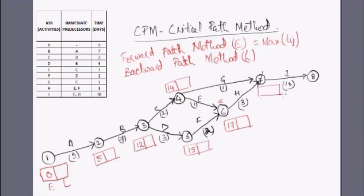At node 7: one possibility is 14 plus 1 equals 15, another is 17 plus 3 equals 20. We take 20 as it is the higher value. Finally, activity I: 20 plus 10 equals 30. It will take totally 30 days to complete the project — this is the project flow time, obtained using the forward pass method.